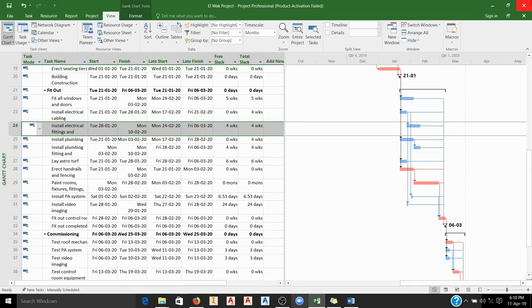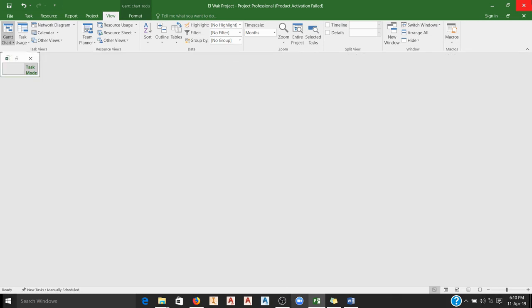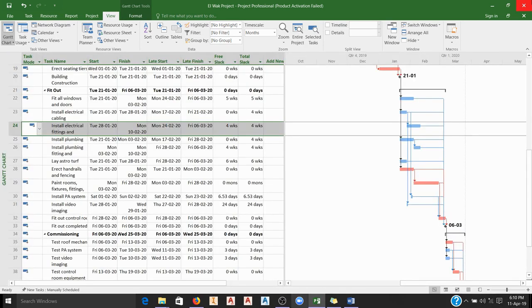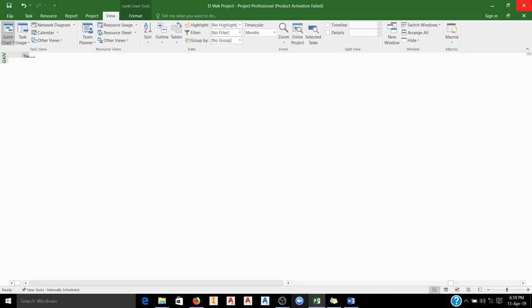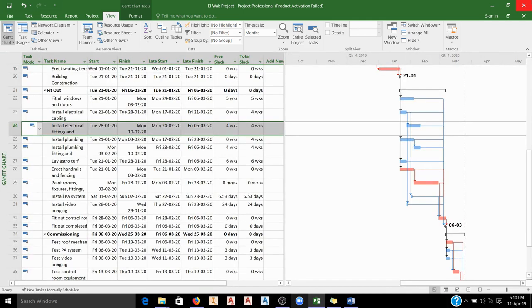Now in that case, the percentage is calculated as a percentage of the predecessor task. So in this case, the time taken to cure will be calculated as a percentage of pour concrete and not a percentage of erect walls. So here is a background to lag time.